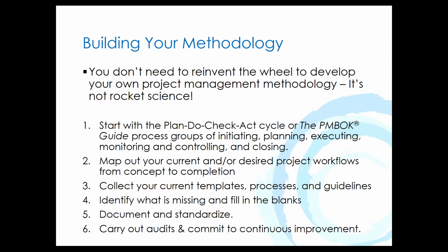Now, the next one to do, and I'm going to show you an example of this in a moment, is to spend some time with your team members and the people doing projects to map out your current and your desired project workflows from concept to completion. Actually map out everything from when a project is a conceptual idea and all the processes and approvals and stages it must go through before it's actually a completed project that's put in place, that people are using, or that it's handed over to a client. Map it out, and I'm quite fond of using a whiteboard for this reason, and I'll show you an example in just a moment of that.